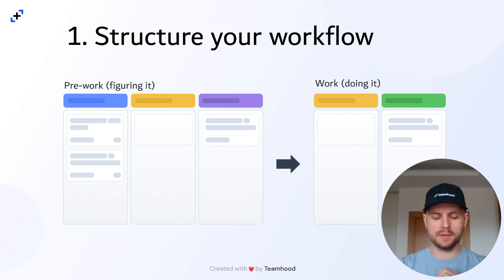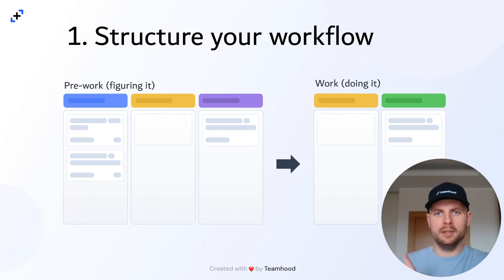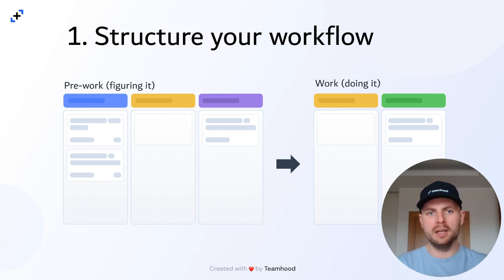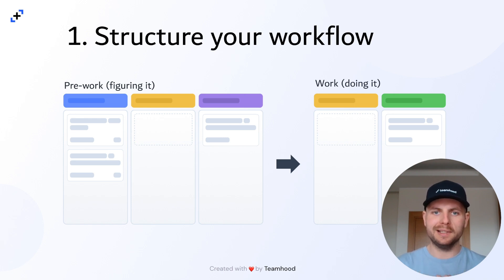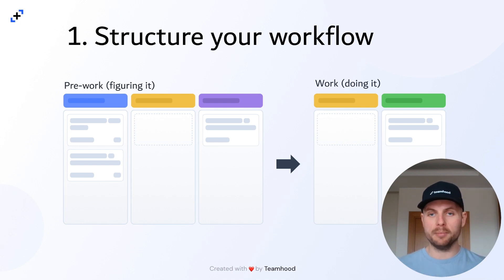That split is useful because this way you will have far better control on quality, priorities, and understanding what needs to be done next. While in the actual work part, you will focus on committing to something and finishing it. We should pull in items that are quality-defined and specified, have their dependencies resolved, and where it is completely clear how we will get to the finish line. If you pull items that are not ready or haven't solved dependencies, they will just clog your process — they'll stay in progress, pile up the queue, and it's going to be a waste.